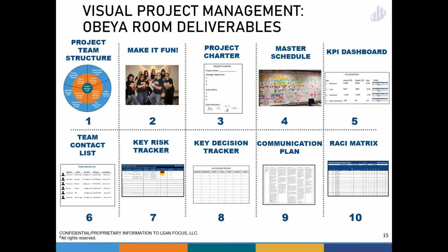The KPI dashboard should be a result of this step, right? So we should be looking at this and saying, what are the critical paths? What are the key deliverables? And what are the leading indicators, the lagging indicators? What's that blend here that's going to really tell us if this program is on track, right? So revenue is a lagging indicator, but forecasted revenue or first date of revenue or funnel value tied to our key accounts might be something you put in there, right?